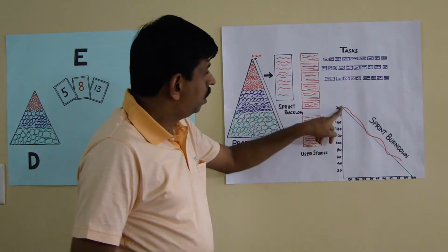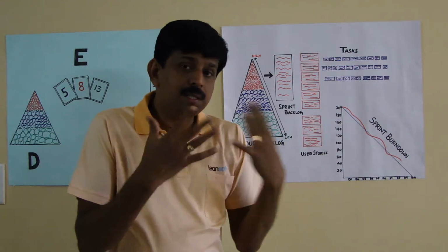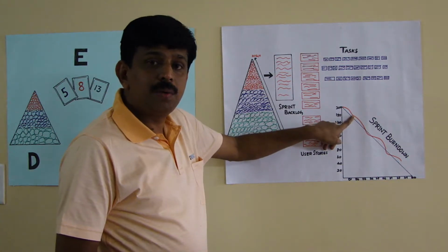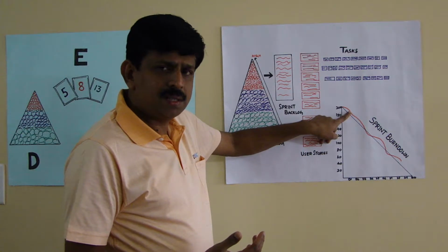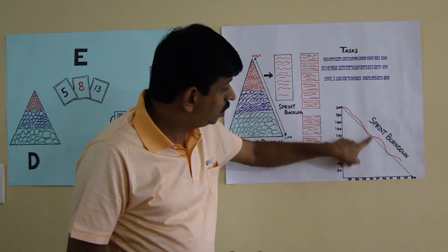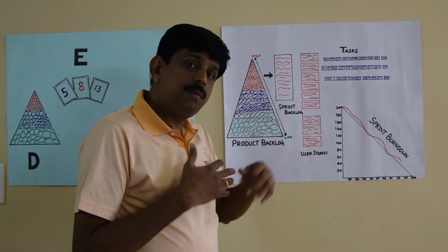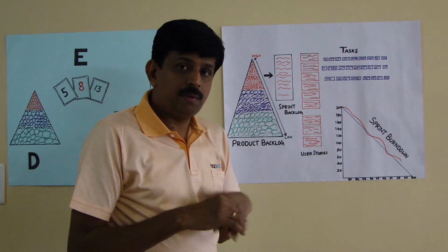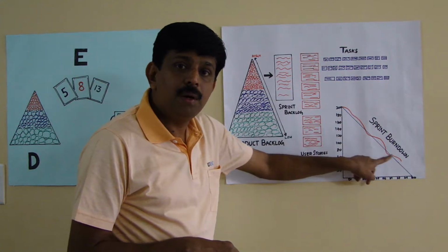Yeah? So, what if we don't burn 20 hours of work? We spend 20 hours. That doesn't mean that we have burned 20 hours of work. Right? So, what if we have not finished 20 hours of work? The burn down will show that, hey, we just completed only 10 hours of work. So the remaining work is 190 hours. It's not 180. So that tells me that hey, we're not on track. There's a delay here. So every day the team can measure whether we are on track.